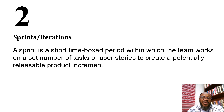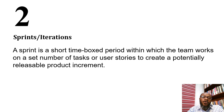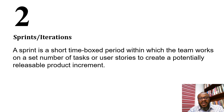A sprint is a time-boxed period. Some teams work in one-week sprints, others in two or three weeks, and for large complex projects, four-week sprints. We time-box sprints so the team maintains a steady pace. Breaking work into smaller sprints allows the team to celebrate smaller successes and create increments by installment, focusing on a set of user stories and completing them.